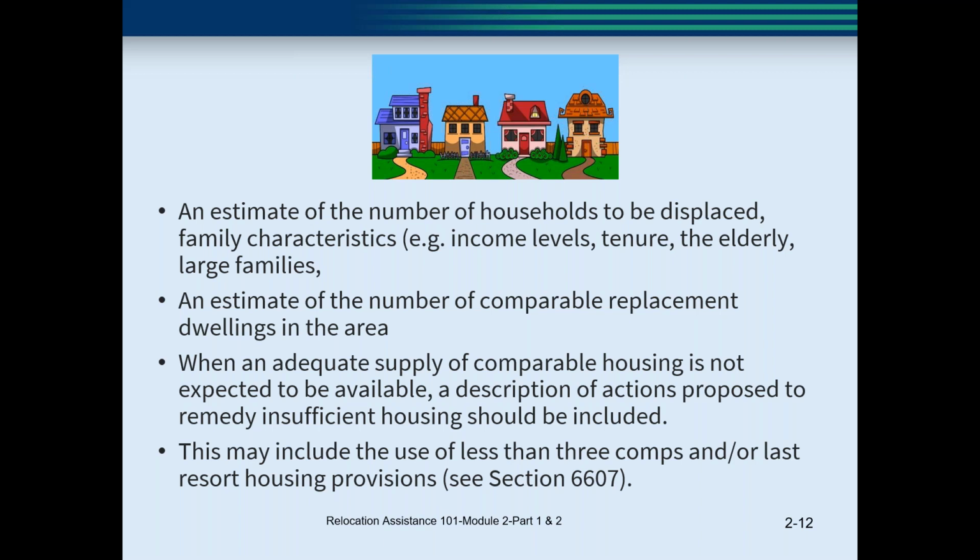You're going to discuss when and if there is an adequate supply of comparable housing, and if there is not, what's your solution? You're going to estimate if you think you're going to have determinations using less than 3 comps, or if you think you're going to have last resort housing.